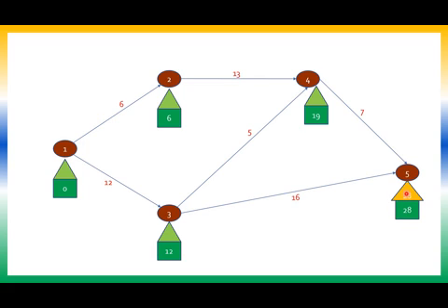So that will be the initial value for the backward pass computation. So 28 minus 7, I get a 21 here. So 28 minus 16 is 12, and 21 minus 5 is 16. So out of 12 and 16, whichever is minimum has to be written.